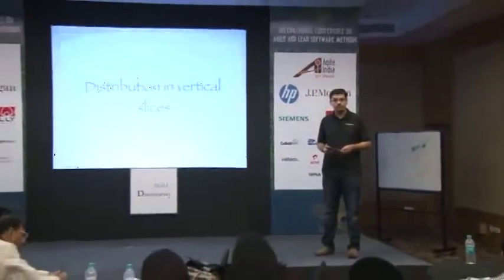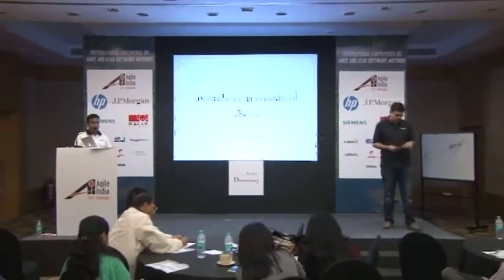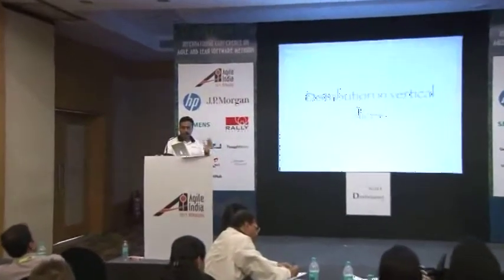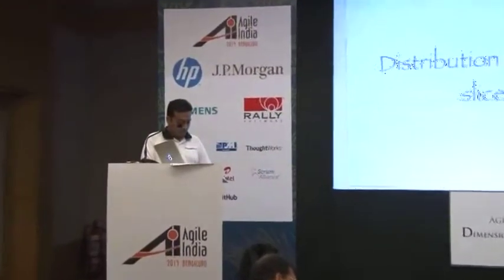The other thing that's really important while trying to set up a distributed development team is to figure out how to split up work, what kind of work should be done in one location versus the other. And here our strong recommendation is to ensure that work is split vertically, meaning you carve out a set of features and make the offshore team the owners for those set of features, carve out a different set of features and make the on-site team the owners for those.